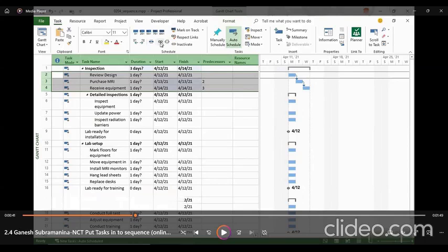It creates finish to start dependencies, which is the most common type. We can see the link lines on the right in the time scale. Once one is finished, the next one starts: finish, start. And we can also see the task IDs of the predecessors in the predecessor cell.